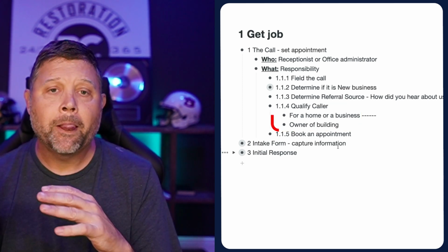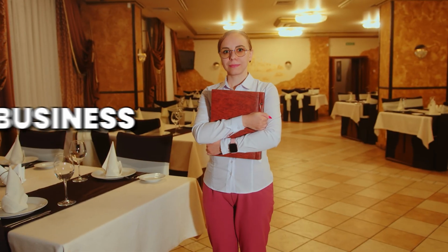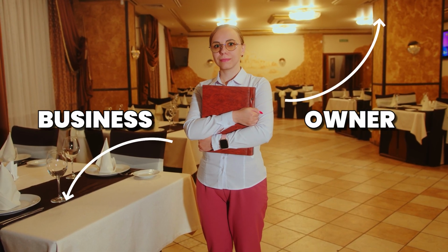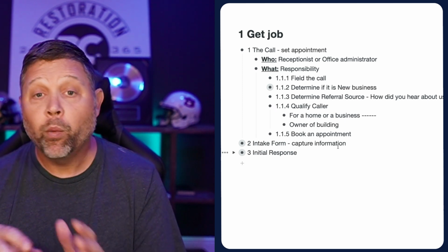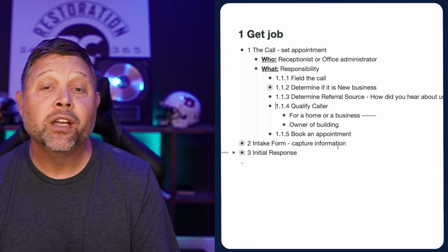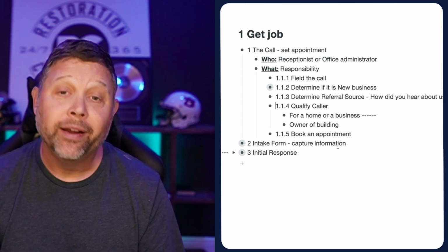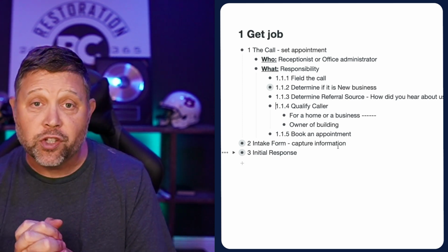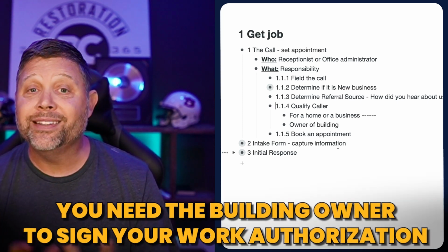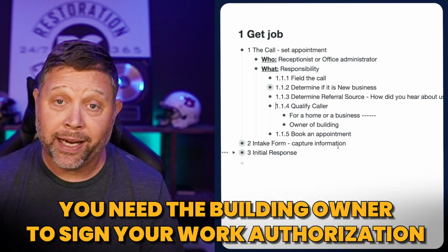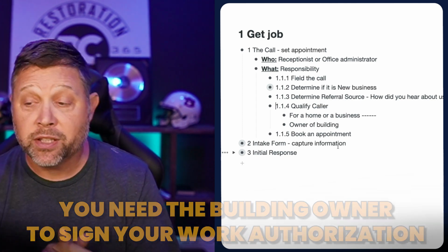The reason why home or business matters is because if it's a business and they're the owner, what are they the owner of? The business or the building? Because we don't work for renters. And if you own the business but you rent the building, you are a renter. And that is a cash job. You need the building owner to sign your work authorization, ladies and gentlemen. Otherwise, it's a cash job. And it needs to be, I'm just telling you.